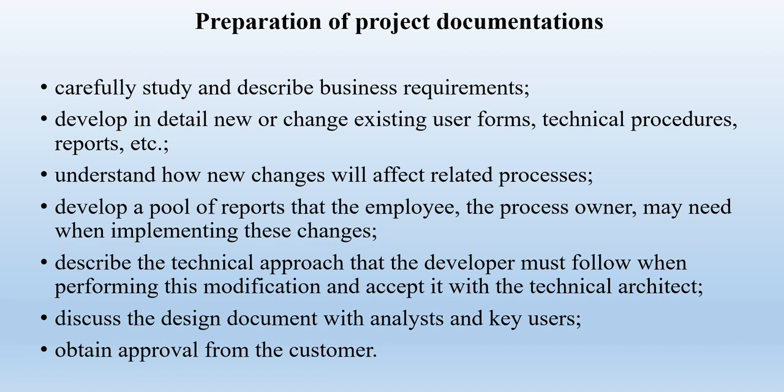To successfully create the document, you must perform the following steps. Careful study, develop in detail, understand how new changes will affect related processes, describe a technical approach, discuss the design documents with analysts and key users, obtain approval from the customer.